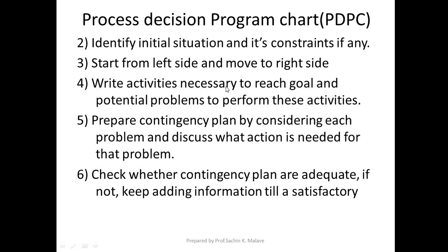Write the activities necessary to reach the goal and potential problems in performing these activities. So you have to go on doing this step by step. Whatever activities are necessary to reach the goal, you have to write them one by one. And also you have to write the potential problems in performing these activities.